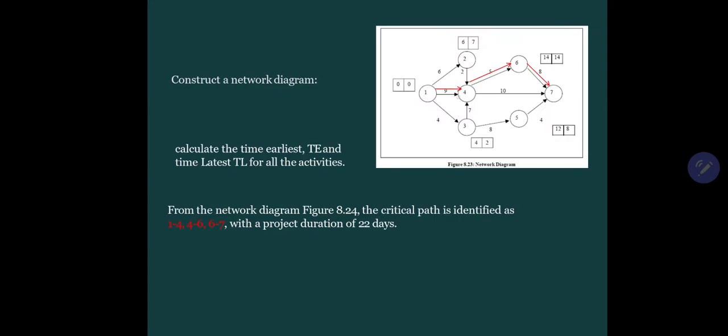Second step, draw the network diagram. We have already drawn the network diagram here. First, this will represent TE and this one will be TL. So 0 plus 6 is 6, 6 plus 2 is 8 here. Or from here, 0 plus 4 is 4, 4 plus 8 is 12, 12 plus 4 is 16. Like this way, we will calculate all the TE and TL.